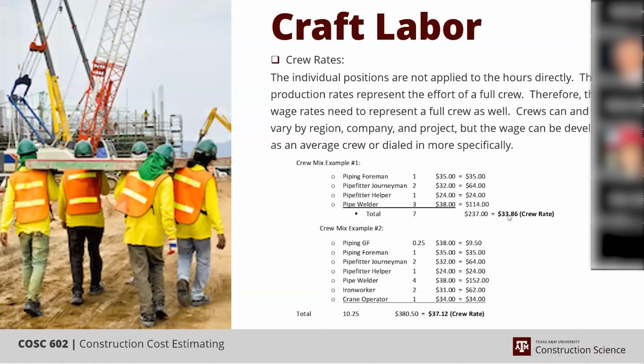Now we don't have general conditions, we have indirect costs. The reason they're not the same, but they're similar, is that general conditions usually relate to a commercial contractor that's 100% subcontracting the work and managing it. The subcontractors have a lot of the indirect infrastructure, and the prime contractor has their management staff and a few general items.